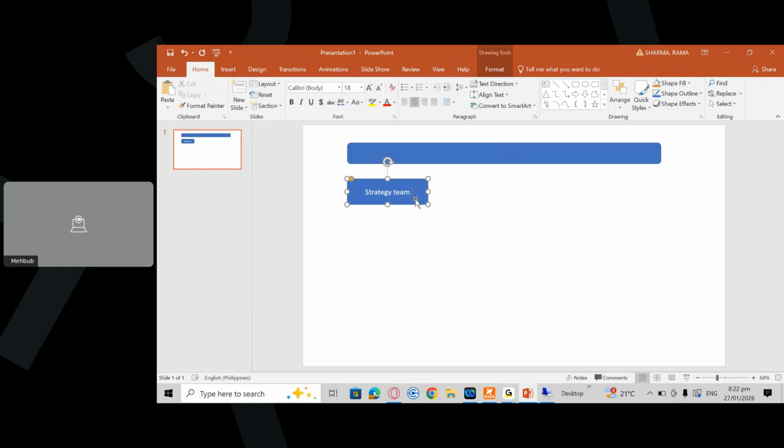So that part, when we are going to submit any idea or any initiative and then it goes for approval, comes under EPPM, enterprise portfolio and project management. Once that concept is approved, it goes for further, detailed planning, and then for execution. When construction is happening, that time it comes as a part of project system.